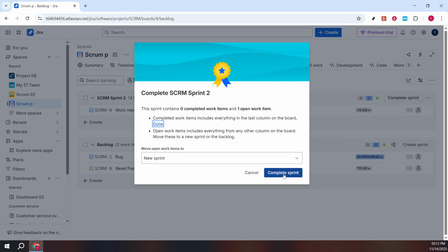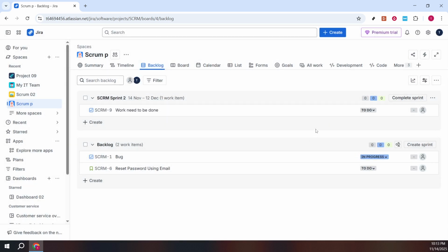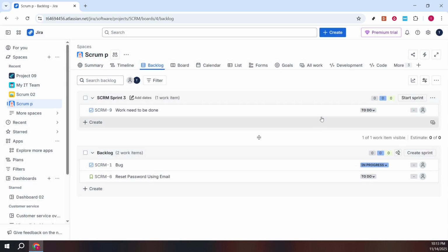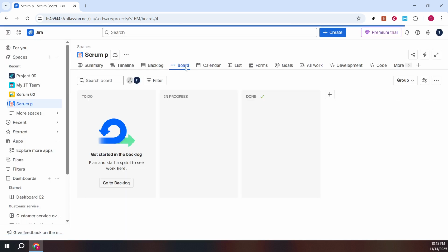Here you can verify which tasks have been completed and assess any remaining ones, providing reassurance that everything is recorded correctly. Keep in mind that closing a sprint is a significant action as it wraps up the current cycle and moves or archives the tasks as necessary. By doing so, it enables your team to focus on new objectives and start the next sprint fresh.